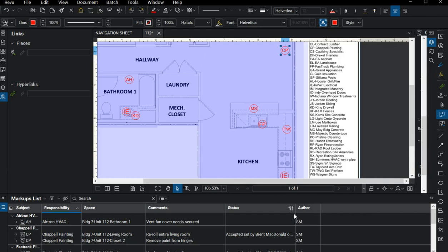So from the time that they were notified of this issue, such as an email, 48 hours later, if that's their contract, I can show physically that, hey, we sent you this email at 6 p.m. on Tuesday night. We rewalked it at 10:30 in the morning on Friday morning, which was after your allotted contractual time to complete the item, and you still didn't complete it. So we start getting into arguments of back charges and whatnot. That's some powerful information to have available to you.